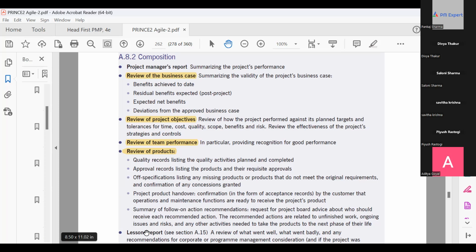Now, this kind of report, tell me, this is a project closure report. This report will go to the project sponsors, the ones who approve. When they stamp this report, then the project is officially closed. So this report is very, very important, and it's an important event-driven report. This is a project closure report. Now, if I talk about the phase closure report.